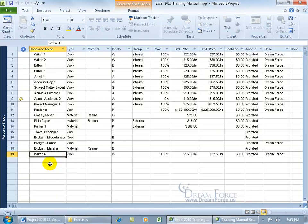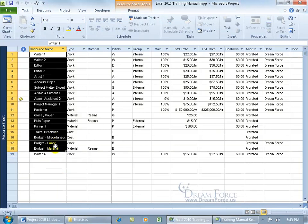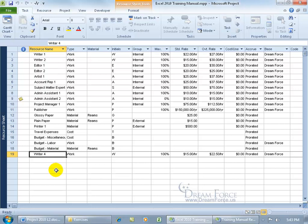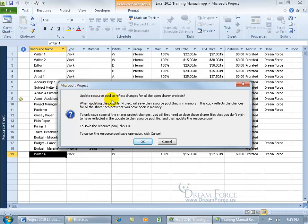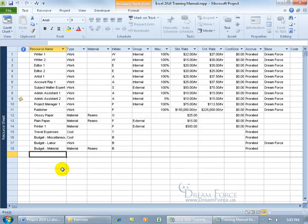Picking up where we left off: the resources got pulled in because we linked to the resource pool, and we still have the original resource Writer 4. The problem is that any time you have resources in your project that aren't from the resource pool, when you click Save, the resource pool is going to want to update the resources and remove anything not from the pool. When I click Save and it asks to update the resource pool — click OK — Writer 4 is gone.